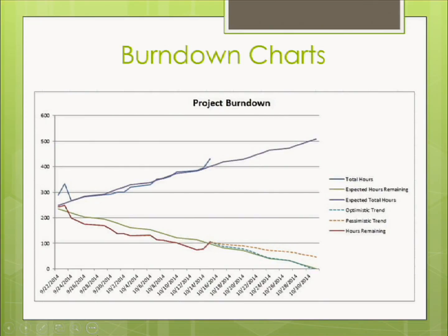Well, when someone questions, well, why do you think that? If it's just your word against theirs, they're always going to pick theirs. But when I can back it up with actual data and say, okay, well, on this last project, we had a similar thing, and scope tended to increase by 8 hours every day because of unknown things that we kept discovering. So this is why I think we're going to be behind. It's very hard to argue with data because it's something that actually happened. It's not an opinion. It's not a guess.